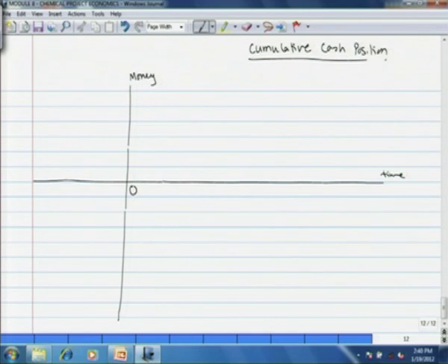So, time 0 is, let us say, the time when operation is complete or the plant operation starts. So, the negative of the x axis, that is the time axis, would indicate the construction of the plant. Let us say it takes 3 years to construct a plant. So, at time -3 we have to buy the land. Now, this is money. So, this much is the land cost, and at time -3 years we buy the land, and then as construction starts we have to invest the fixed capital.